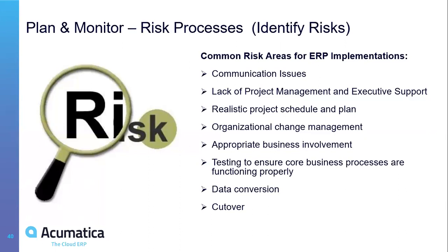It took 2 or 3 weeks to fix it for the SAP vendor. It was fixed, and then it worked fine, and everything in the end was okay. But I'm telling it to show you how important testing is, and especially the core business functions have to work after go live immediately. And the other thing, and you know this maybe better than me, data migration is always a big risk in every project. That the customer is not able to provide the data, or if they provide it, it's all wrong.